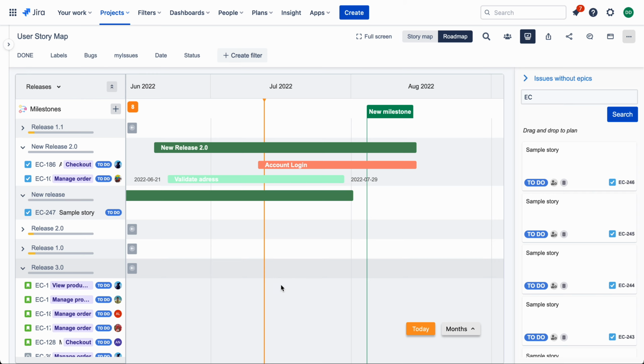and the start date and end date on the roadmap are by default stored in the plugin's database, but you can reuse Jira fields. For example, in your Jira project you may already have other date fields on your Jira issues, for example start date or due date, and if you want to reuse them, you can map the start date and end date with Jira fields using the setting for admin.